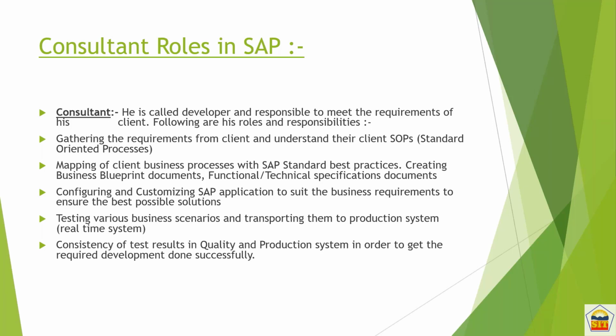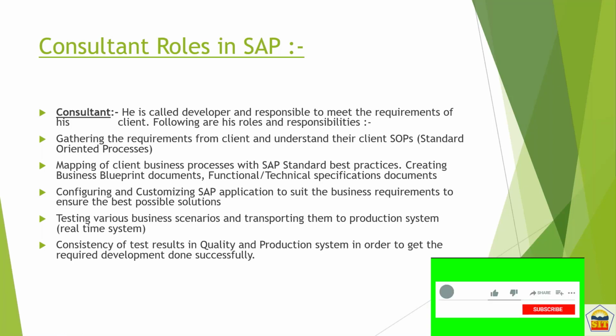So it is saying that the next thing after the configuration is the testing. So here we will be doing the testing as a consultant. We will also ask the business to do the testing, and based on that, if all the things are going well, if all the testing results are positive, then we will be moving that solution to the production system, which is the actual system which is to be used by the business.